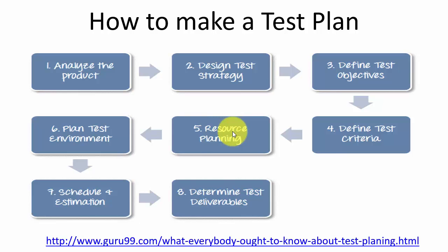etc. Then you need to define some test criteria. When are you actually finished with the testing? We'll talk more about these things later in the video. Then schedule and estimation. When are you going to test? What will the test cost you? Of course, as I said earlier, testing is 50% of the total development time. So of course testing costs a lot of money, but again, testing is very important in order to find critical bugs in the system before you start using it.